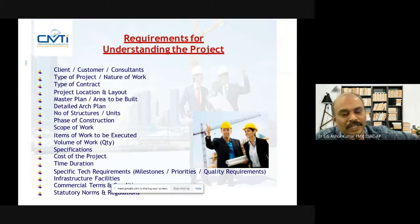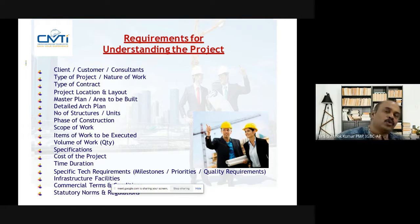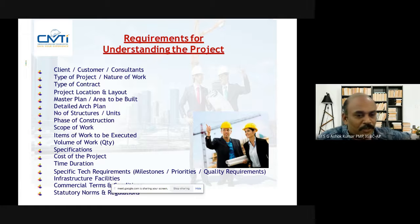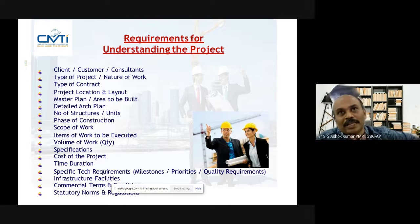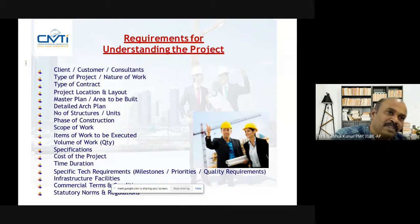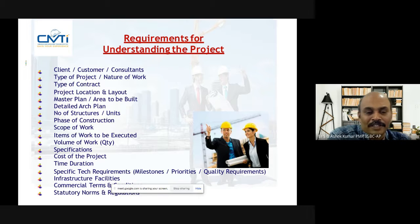Next is cost — based on your specification and quantum of work only, cost is decided. These tools are used for capturing the cost and preparing the budget. Time duration is arrived at by previous experience — how the earlier project was completed, how much time it took. Present project time is also calculated based on previous experience as well as the quantum of work. Time is nothing but quantity divided by productivity — you will understand how many people are required.